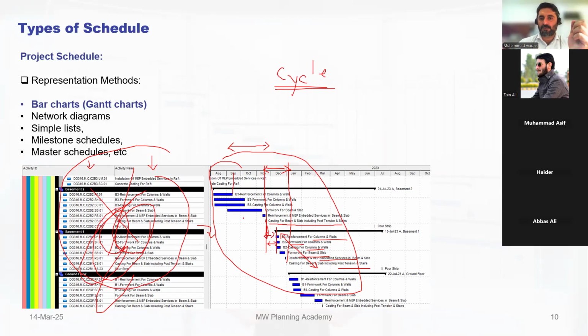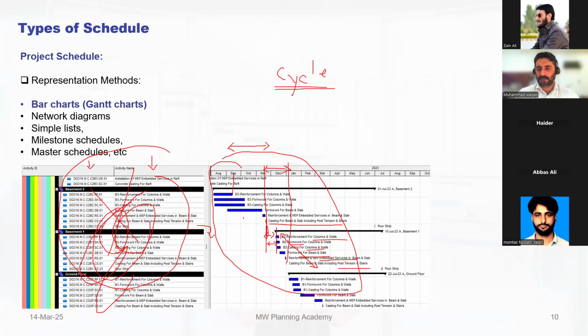So you can do one column in 3 days. Now you can do all 50 in three days also if you have the manpower. But normally we don't do 50 in one go. We will do 10, 10, 10, and then you will do it in 10 to 15 days. So yes, you are right, it's not straightforward 45 days. It depends. But normally we say it will take 1 month, because even if it's a small slab, we will go with 1 month because of all this cycle.